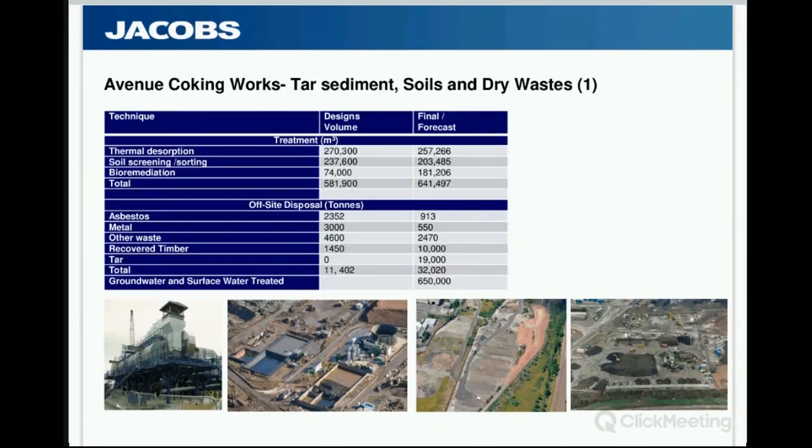Each batch of soil was tested in 250 cubes and verified, its location recorded in a CAD system, and the as-built conditions were then modelled, re-run in CONSIM and the other risk models that were used to derive the criteria in order to demonstrate compliance. The scheme's been verified within an inch of its life. In any given square meter, we can tell you precisely what material was there and where it came from and how it was treated and what the chemical concentration was.